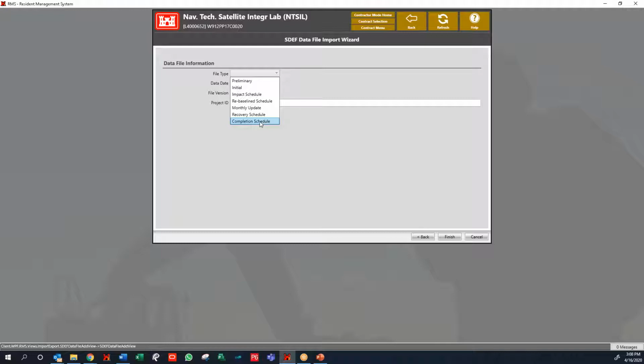This is the completion schedule that I was referencing a few minutes ago that'll close out a project if your particular district requires that. Some do, some don't. I know you guys are familiar with the different districts and even different CORs, QAs, ACOs, always look at things a little bit differently. So communication's key on this, but if it's just a regular monthly update, we put it in. File version, it's almost always one, unless you're resubmitting. The project ID, I use this number right here, because this is the ID that comes through via RMS, and it keeps it clean and easy.